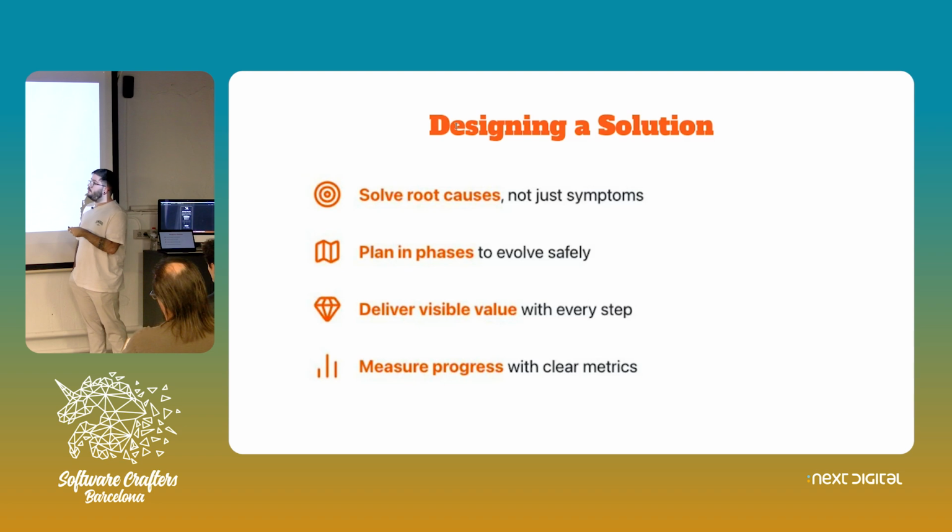Then at the end of each phase, it must have a deliverable value, and it should be visible and easy to understand. In our case, we had milestones. The main reason for this is that the same way things change, the opinions of product and upper management may change as well. If we've been doing this for 3 months and nothing is being seen as valuable, we're at risk of this whole process getting cancelled, and the trust between us and management is broken. And when things break, it's really hard to get it back.